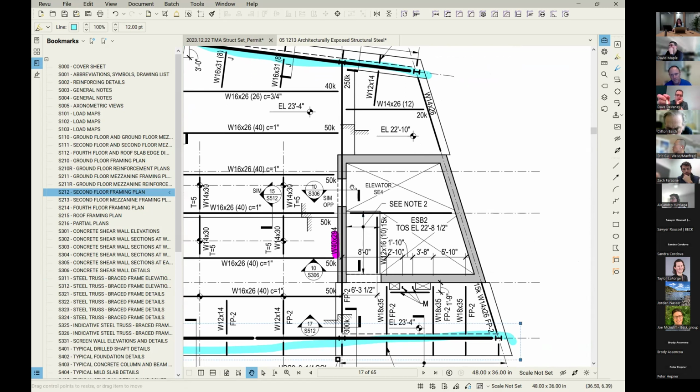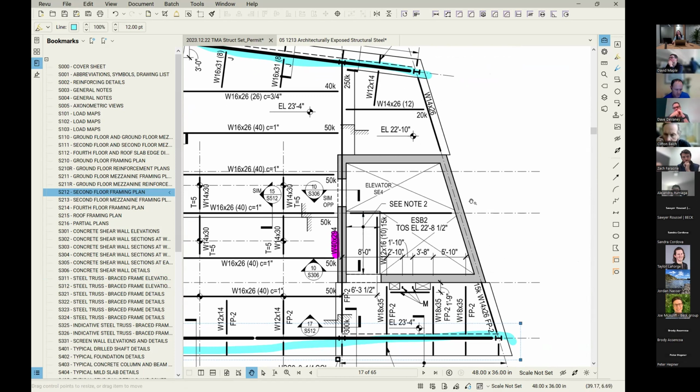And I've got a question while we're sitting here before we get to that. Have you taken into consideration the garage? I'm thinking of the formwork for the shear wall, and they'll want to slide it up. What kind of distance do we have between that shear wall and the face of the existing garage? Is there any room to slide the formwork up? Yeah, it's close, right? Well, there's a finish on the metal panel, right? So there's some dimension. But I'm thinking the metal panel system is 6 or 8 inches thick, and that formwork is a lot thicker than that.